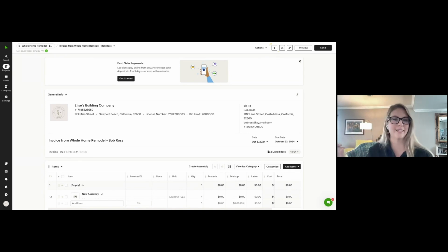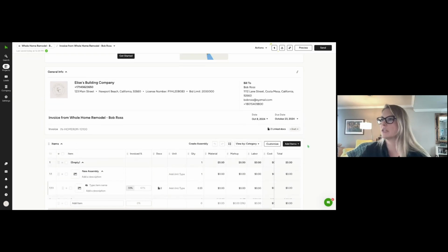again, why categorizing is really important, especially on a document, is to go and look at each category and say, okay, is this like phase one? I should invoice for this, and just select those items. So I can do another example showing, instead of invoicing the whole document, doing it by pieces. I'll do that in just a sec.